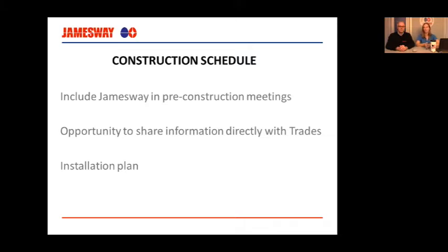So often when that link isn't there, the subcontractors don't know when we need things. They don't know to be careful around our machines as they're being put up. And that causes a lot of conflicts or interruptions on site. So it's really important that not only do we speak to you, the customer, but that we speak to the general contractor, and any sub-trades that may have questions directly to ask us. Yeah, the more communication, the better. That way we can resolve any issues and prevent issues from happening.